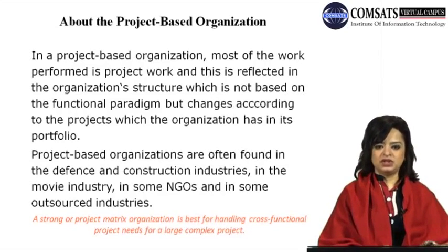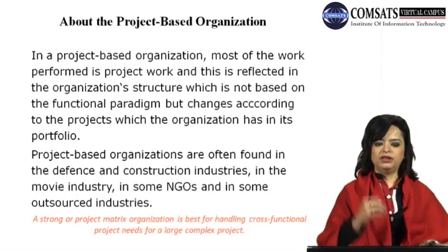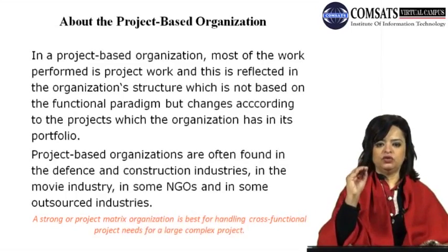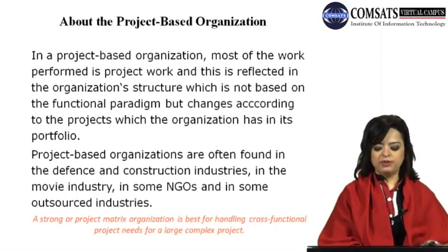These organizations, they get a project and they get human resources, or they get resources to work on all of these activities, which are a little bit of procurement, a little bit of human resources management, a little bit of this, a little bit of that. But the main goal is only to fulfill the needs of that particular project. Project-based organizations are often found in the defense and construction industries.